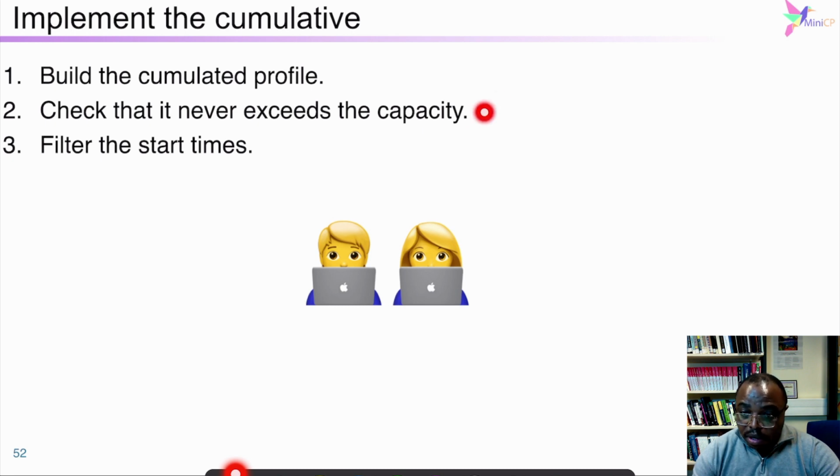It is then possible to check if the capacity of the resource is exceeded. This will happen if the height of one of the profile rectangles is greater than the capacity of the resource. We therefore use the mandatory part of activities to build the mandatory profile.